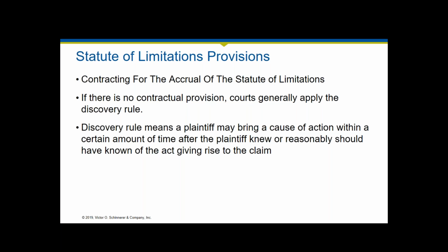The accrual date for damages arising from a latent defect in design and construction is a gray area. When did the owner actually become aware that this defect is affecting the facility? When is that date determined? Is it earlier in the occupancy of the project or is it later? That could be a gray area. So a contractual provision defining the actual date for causes of action serves a valuable purpose for both parties, knowing when the clock starts ticking.